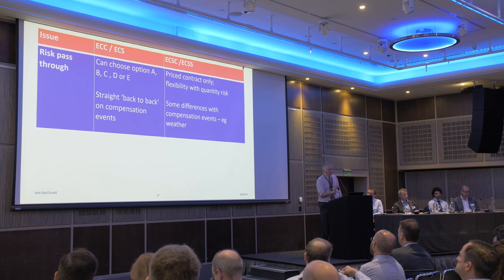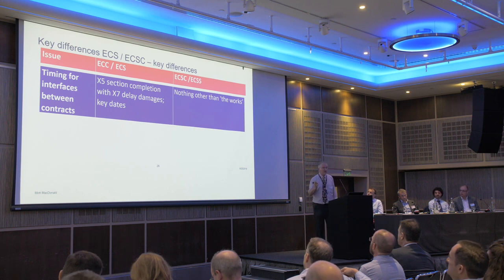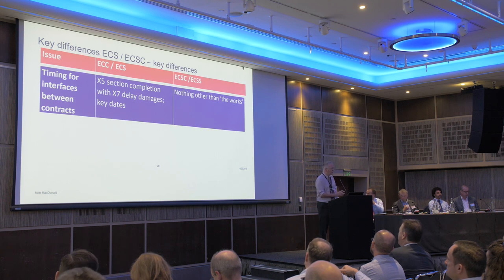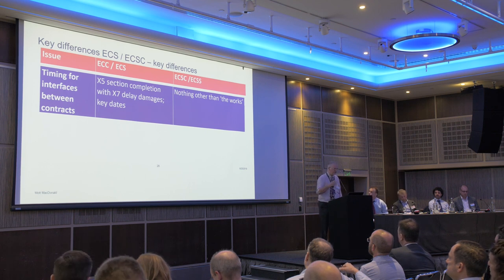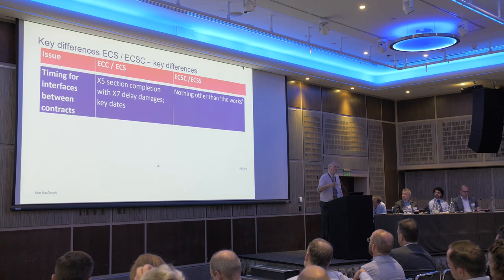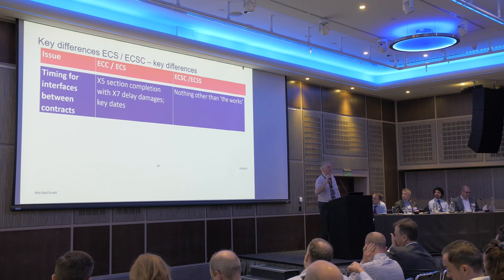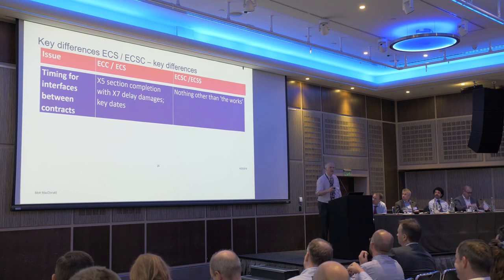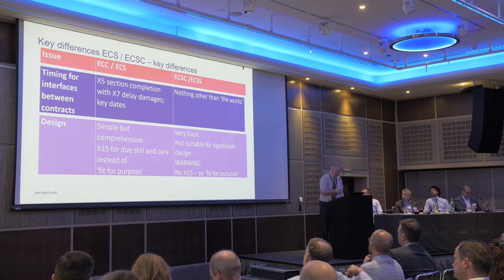Some subtle differences on compensation events — the most obvious being weather: a clear 1-in-10 on the ECC, more simple in theory on the short contract, but there's a mismatch. A contractor ought to be aware of that mismatch. A big issue on timing given all those interfaces: in the ECC you've got sectional completion, delay damages, and key dates. In the ECS you've got nothing — it's just 'complete the works.' So if your short contract has various bits to interface with other contractors, you've got to start adding words to make it work.